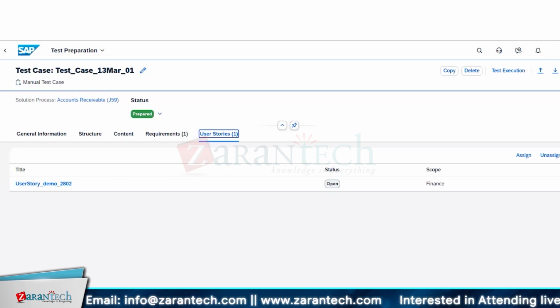Yeah, I'll come to that point. If there is an issue in the FUT phase, it's on our end, for example that a transport is not done. We can change the status and do that correction in the test itself. We can identify that. So as per my understanding and experience, that particular stage will not be called a defect. The reason I'm coming to this point, Ratan, is that if you identify a defect, a defect number will be created, and for that you also need to make some documentation.